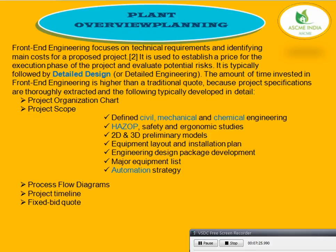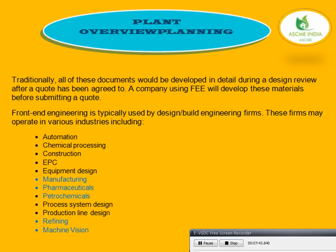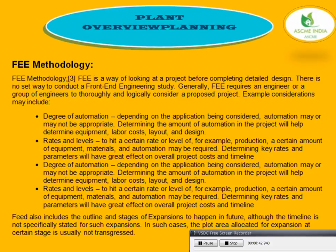A good FEED will reflect all of the client's project-specific requirements and avoid significant changes during the execution phase. The FEED contractor usually takes around one year to complete a large-sized project. There is close communication between the project owner, operator, and the engineering contractor to work up project-specific requirements. The front-end engineering focuses on the technical requirements and identifying the main costs for the project.